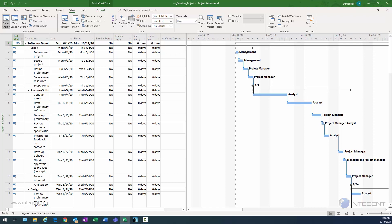With the variance table selected, we have baseline start, baseline finish, and then the variance column. The variance is basically the difference between the baseline and the actual — so for start variance, it's the variance between the baseline start and the actual start. This shows you if your project didn't start when you said it was going to start; there will be a variance showing the number of days the project was delayed. Similarly, if a task didn't finish on time according to the baseline, you'll see a variance there.